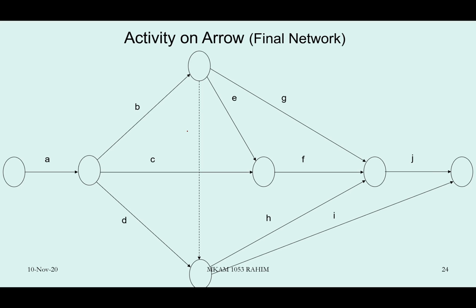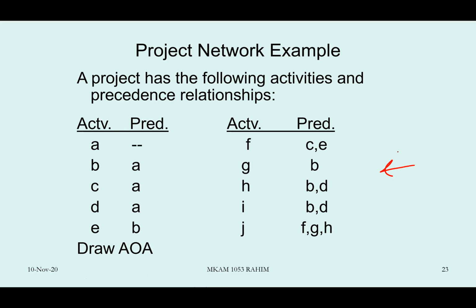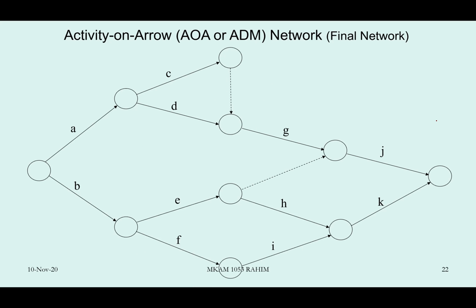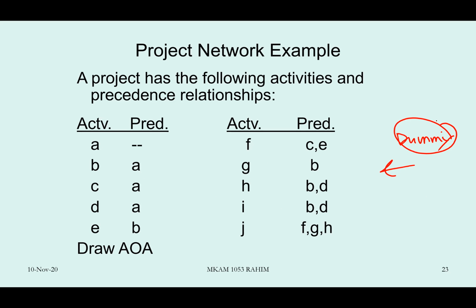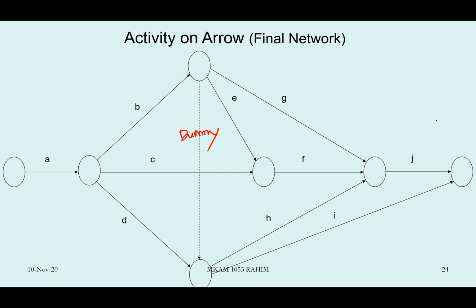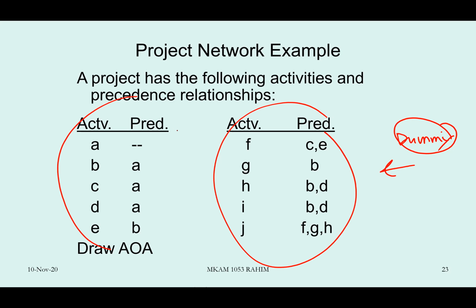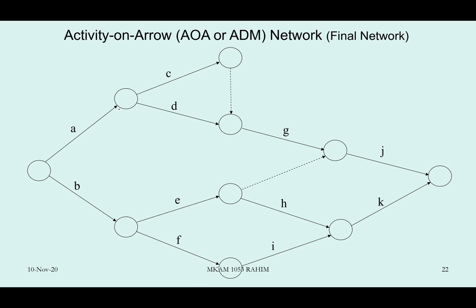And you notice that there is a dummy activity here. Dummy. Whereas inside here, it doesn't tell us about dummy activity at all. So where does the dummy come from? When you draw those things, sometimes you notice that you need to connect from one node to another node in order to have the right relationship between activities. Then you can utilize the concept of dummy. Even though the dummy might not be shown here, there is nothing being mentioned, the dummy can be put inside any diagram because dummy doesn't have any duration, zero duration. It just only wants to reflect.